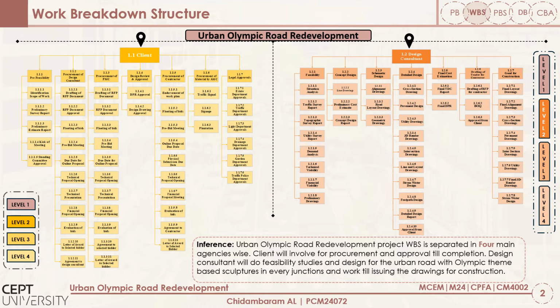Key responsibilities of the design consultant are to conduct the feasibility study, schematic and concept design, arrange a kickoff meeting with the client to get their suggestions, then come up with a detailed design. Once the detailed design is completed, they will finalize the scope of contractor and draft the tender document for contractor. Final DPR with project schedule and cost estimation is prepared by the design consultant. Before the execution, the design consultant will issue the construction drawings to contractor.